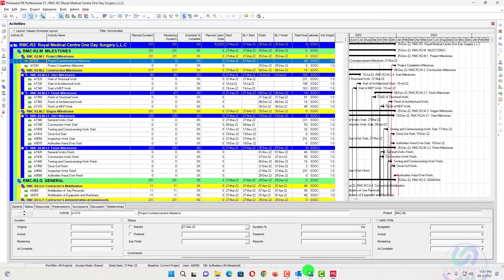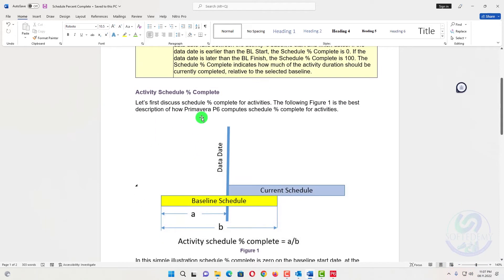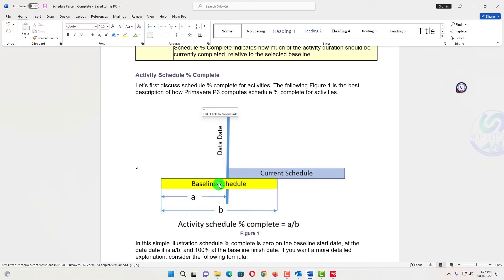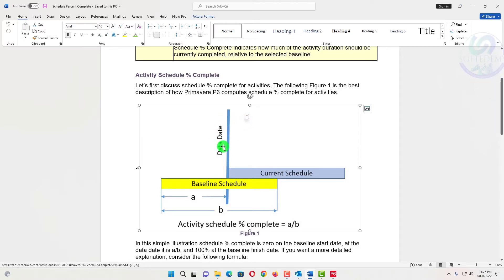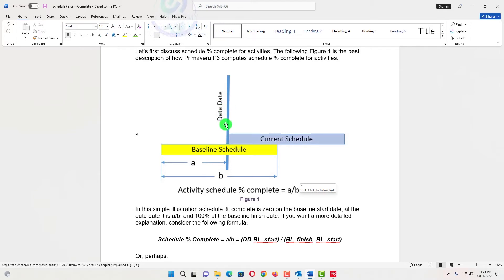Here I have created a Word file where I have explained schedule percent complete. Whenever we have created a baseline, the formula is: A divided by B, where A is the duration from the start to the data date, and B is the total duration. The data date is the date when we run our schedule — for example, our project start is in October.